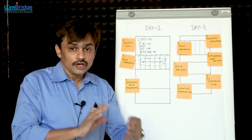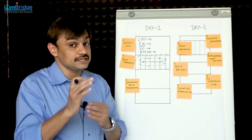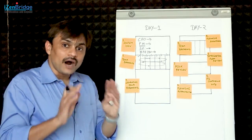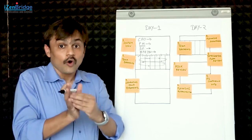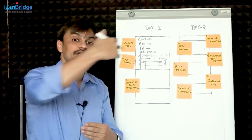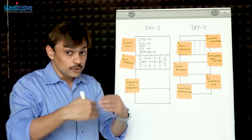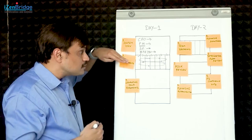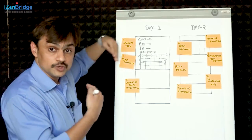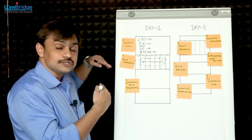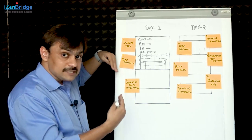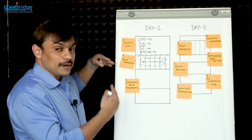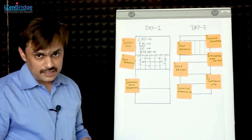Are they planning it in a given iteration? If not, I may want to point out that this will create trouble for my release. I may need to understand what part of a feature the other team has taken because I might be working on a feature and there could be boundary elements which can go in that team or come in this team. So our team's product owners may be continuously talking to each other. Our Scrum Masters may also be facilitating the dependency exploration and integration while we are preparing this first-level plan for the upcoming PI.